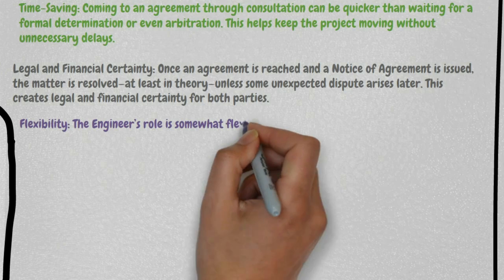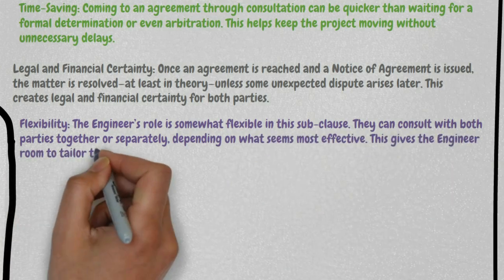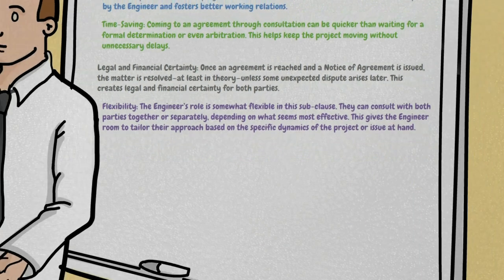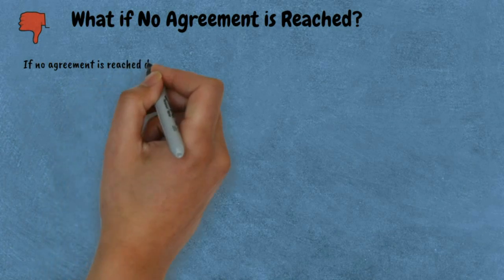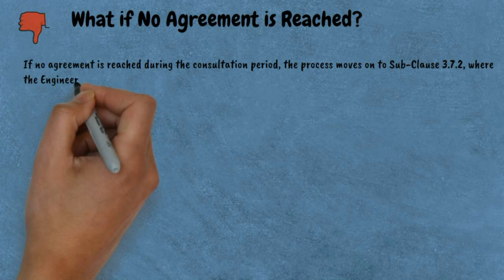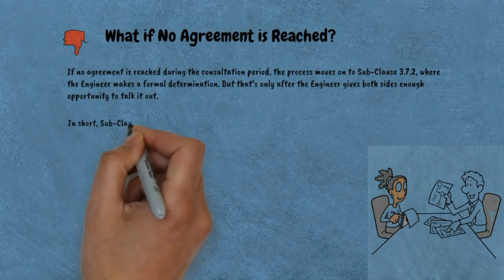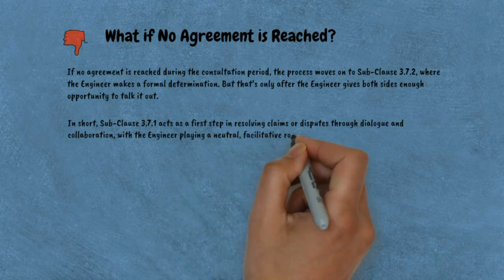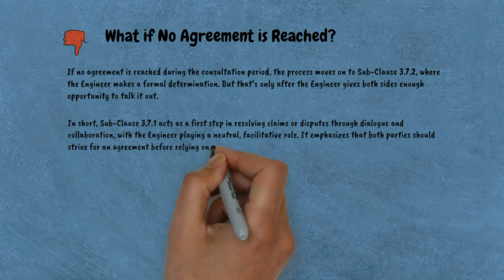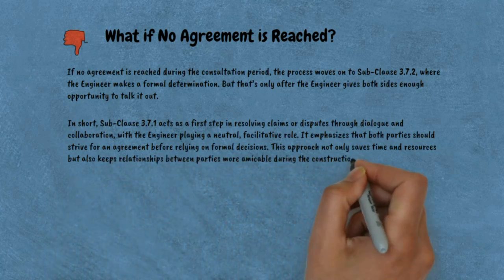Fourth, flexibility — the engineer's role is somewhat flexible in this sub-clause. They can consult with both parties together or separately, depending on what seems most effective, giving the engineer room to tailor their approach based on the specific dynamics of the project. If no agreement is reached during the consultation period, the process moves on to Sub-clause 3.7.2, where the engineer makes a formal determination, but only after the engineer gives both sides enough opportunity to talk it out. Sub-clause 3.7.1 acts as a first step in resolving claims or disputes through dialogue and collaboration, with the engineer playing a neutral, facilitative role, emphasizing that both parties should strive for an agreement before relying on formal decisions.